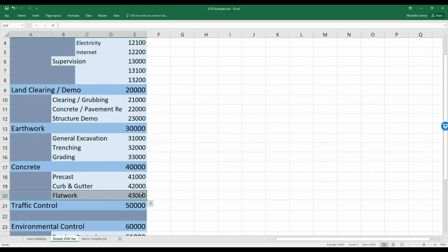So I see a lot of people make distinctions based on the depth or the width or some other factor that generally doesn't have a lot of bearing on how the work is performed. If you're doing a sidewalk and it's 4 inches thick at regulation, or it's 6 inches thick because that city asked you to, it's not usually going to make too much difference in how the work is being performed.